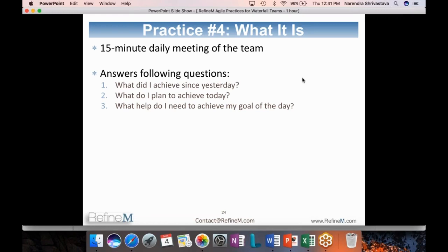Everybody present, in a round robin manner, goes through and answers these 3 questions. What did I achieve? Actually, the original is what did I do? I have changed it from doing to achieving. That makes the person a little bit more accountable. So what did I achieve since yesterday? What do I plan to achieve today? And what help do I need to achieve my goal of the day?